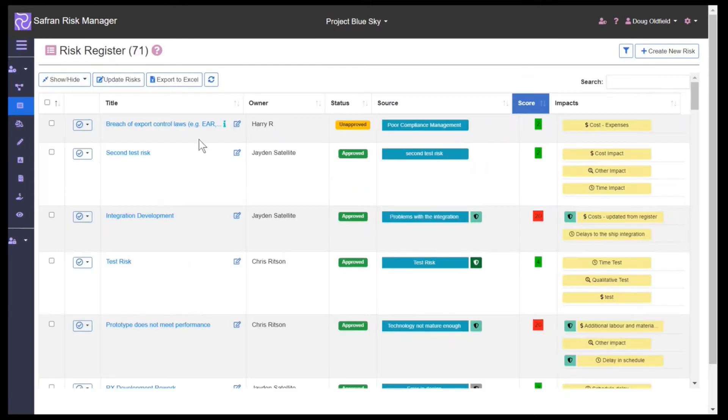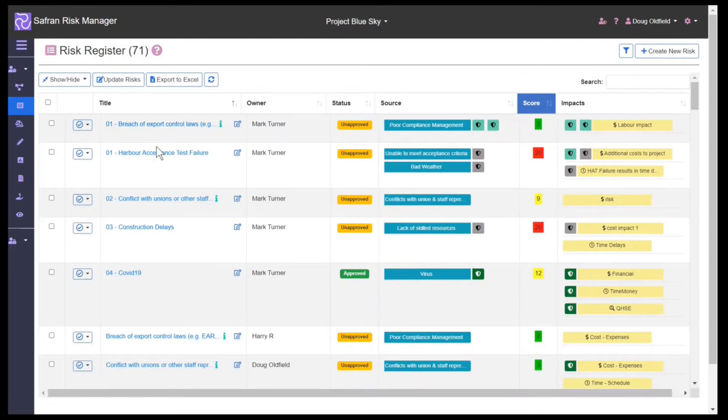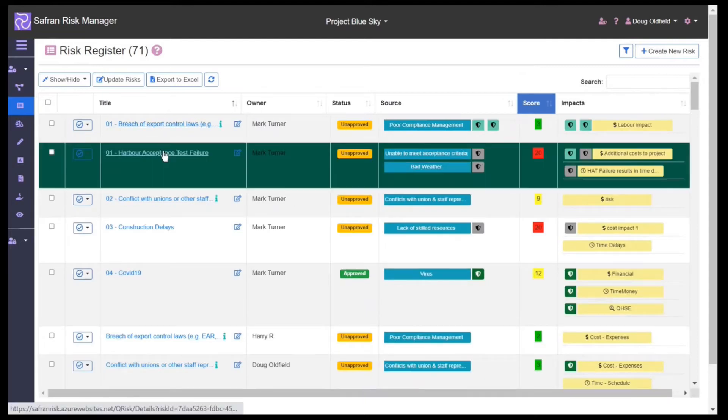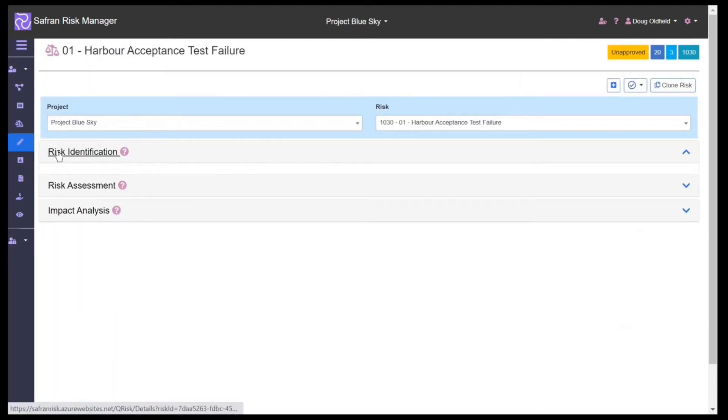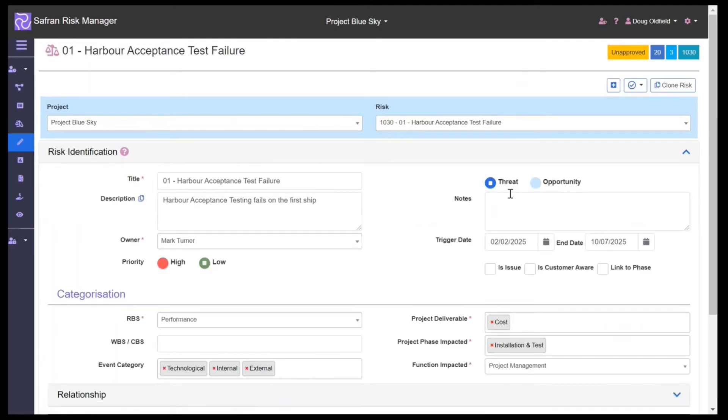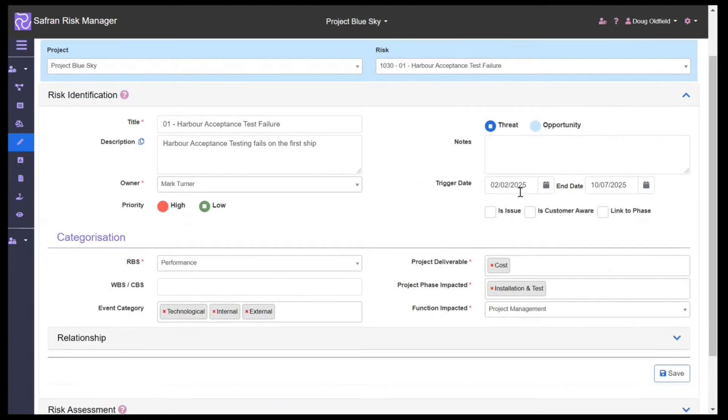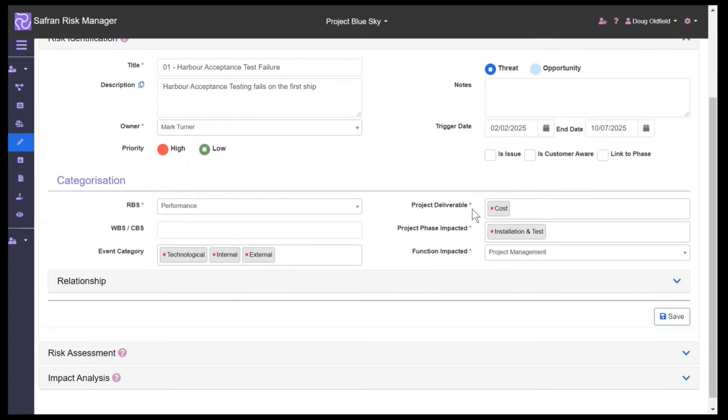If we look at the risk register itself and choose one of our risks, we can see all of the other information which we might collect. Here we can see the dates, the deliverables which the risk is impacting against, the phase, and if there are any parent, child, or sibling relationships.